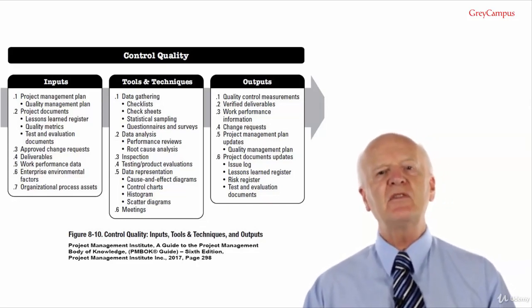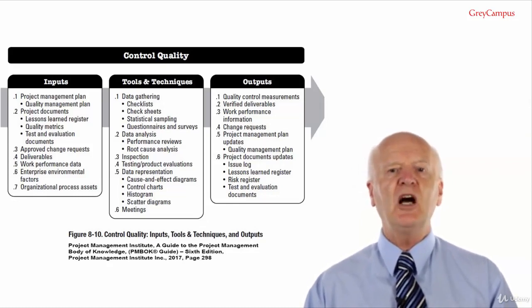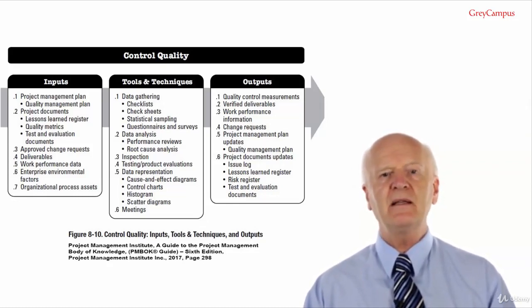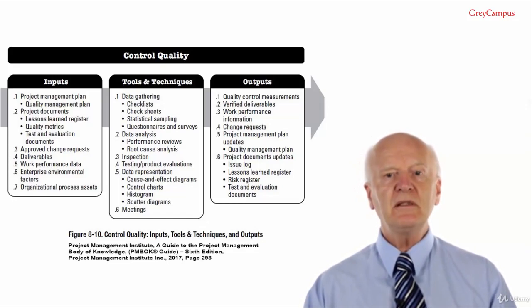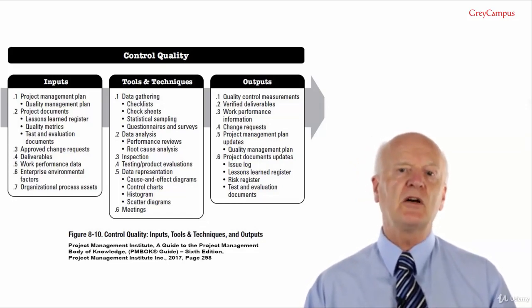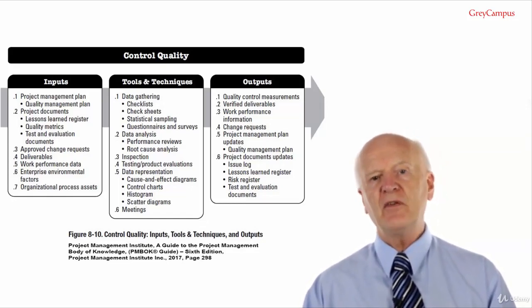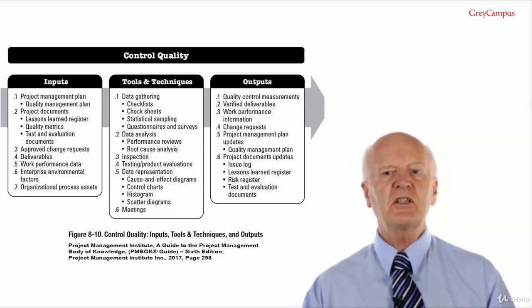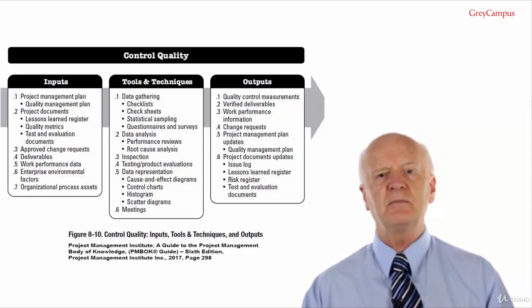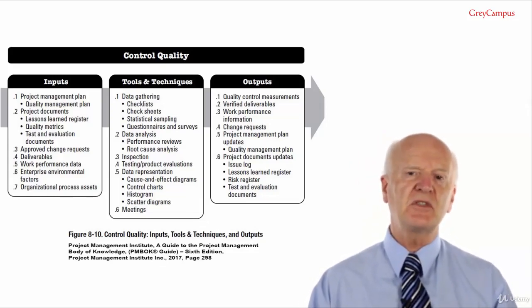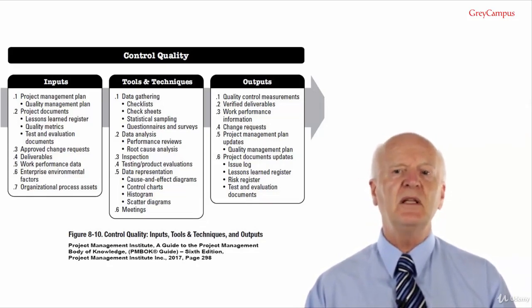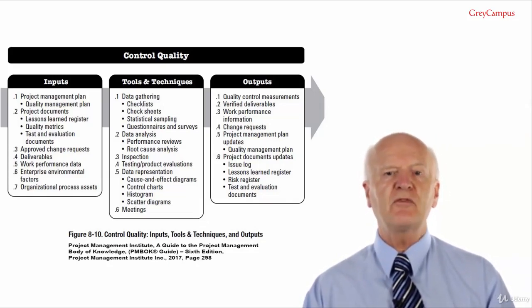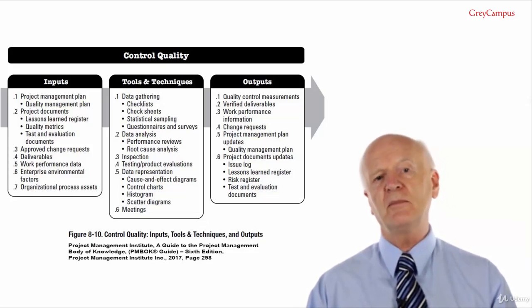The type, amount and extent of tests needed to evaluate each requirement are part of the project quality plan and depend on the nature of the project, time, budget and other constraints. If the project has been to build this car, then all the components of it would have been checked along the way. Finding problems early in the project is a much lower cost option than finding them later. Obviously the actual tests and testing procedures will be dependent upon the project, product and application area. For example, tests required for a car will be different from those for testing a computer program or for testing a house.